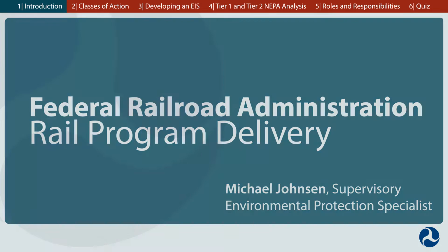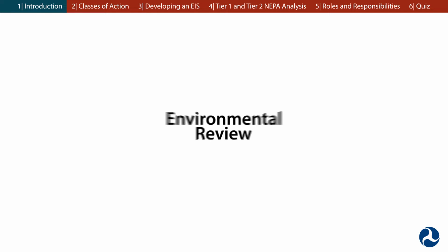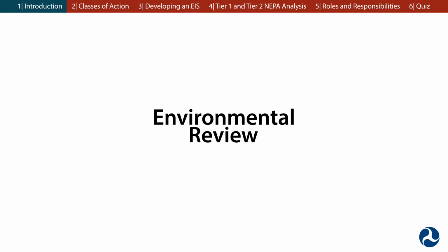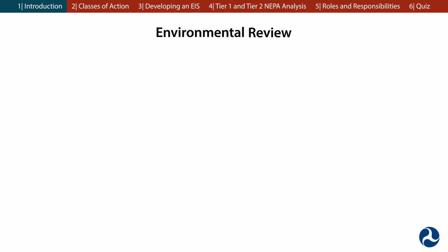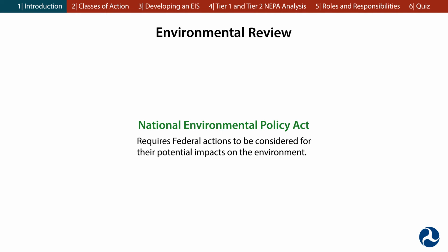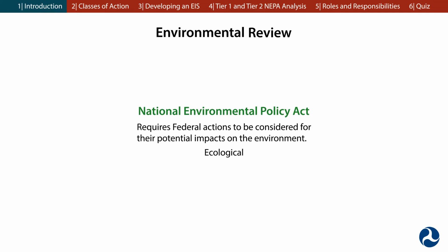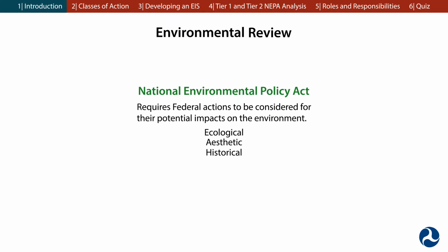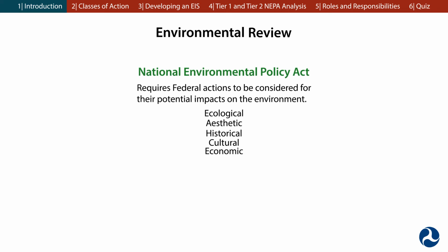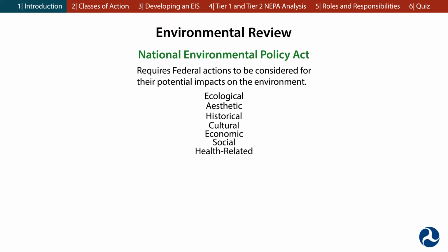Hello, everyone. In this video, we'll cover environmental review, a critical element of the rail capital project development process. The components of the environmental review process are based on the National Environmental Policy Act of 1969, which requires federal actions to be considered for their potential impacts on the environment. Environmental impacts, both positive and negative, are those that are ecological, aesthetic, historical, cultural, economic, social, or health-related.